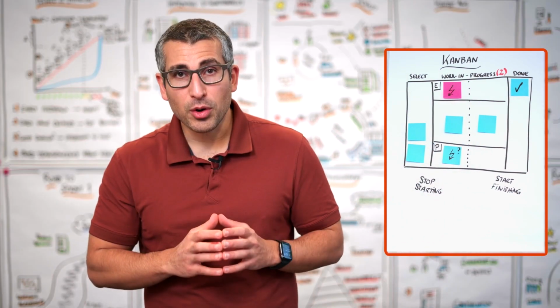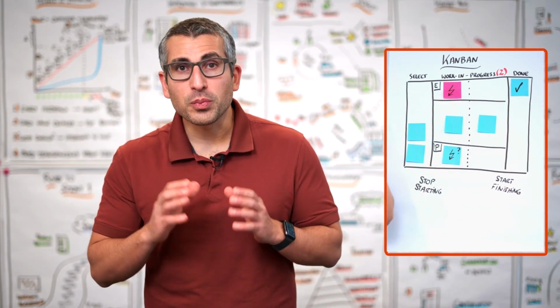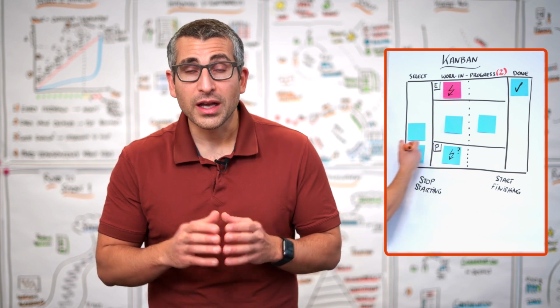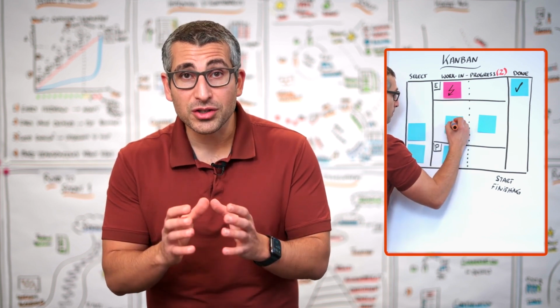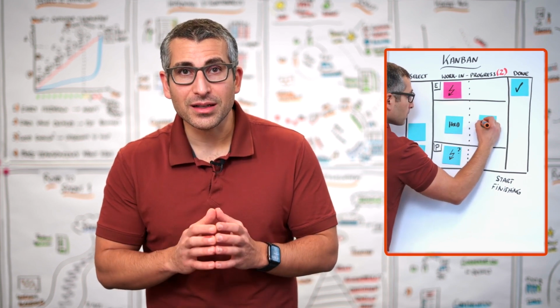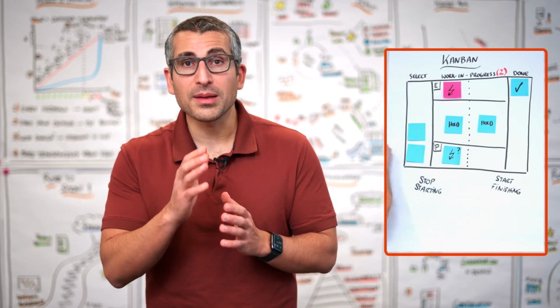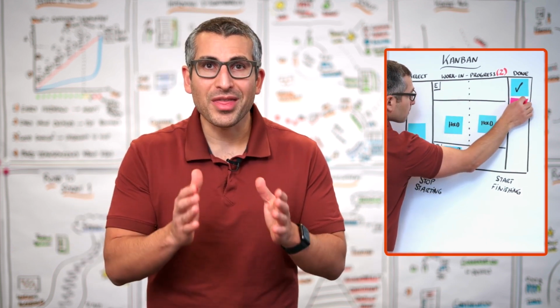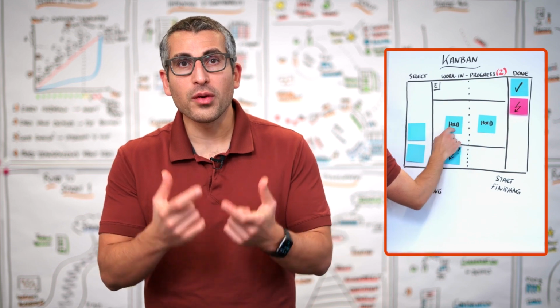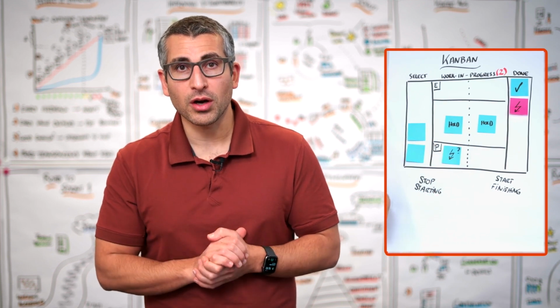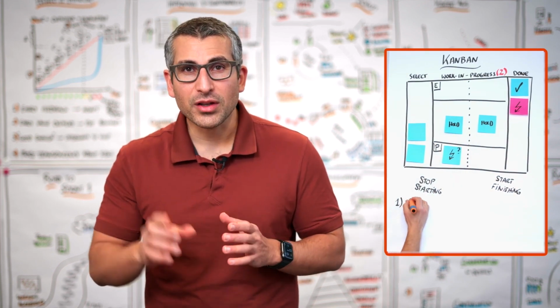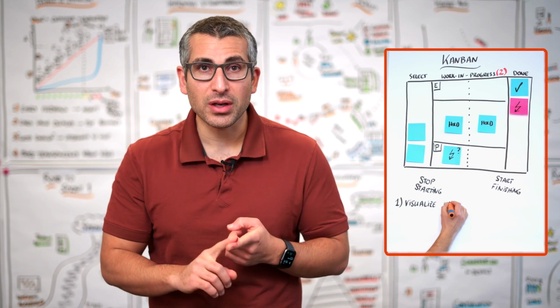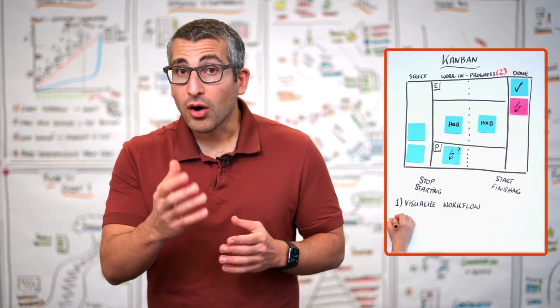And while you have an emergency, I would advise you to put all the other items on hold so that everyone can put their energy and time and skills to the use of moving that emergency item to done as fast as possible, and then people get to focus on the work or on the items that they were working on before. You can see here that you can use this technique individually, within a team, or also as part